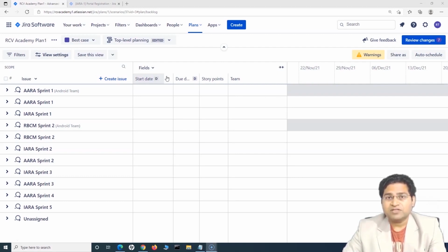If those 5 team members are not taking any planned leaves, so excluding planned leaves and any public holidays, the number of points that can be taken by those team members within that sprint, or the number of days that they can work, if you total that amount, that is the capacity of your team.